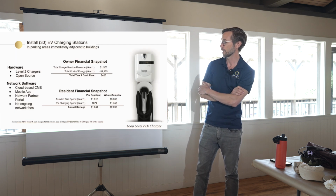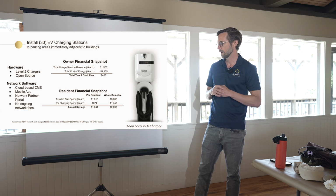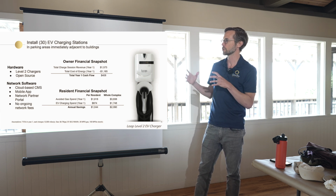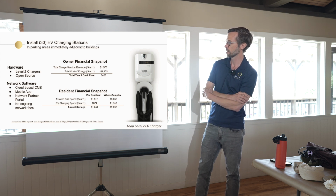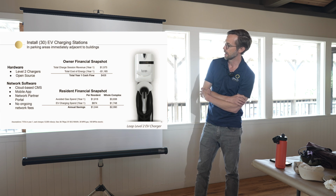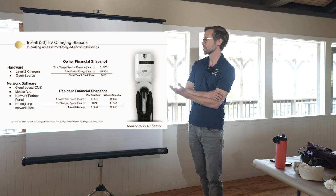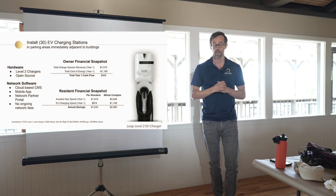Okay, EV charging. The owner wasn't particularly interested in EV charging, but the EV charging incentives are generous in SMUD, and as a general contractor, we can put a whole project together that makes sense. The EV charging helped to subsidize a little bit of the heat pump water heater installation in SMUD, so that was useful. There aren't a lot of EVs at this senior housing facility, but there will be, and the overall price to the customer is better by including EVs, so that's why they went for it. They weren't particularly hungry for the EVs themselves.